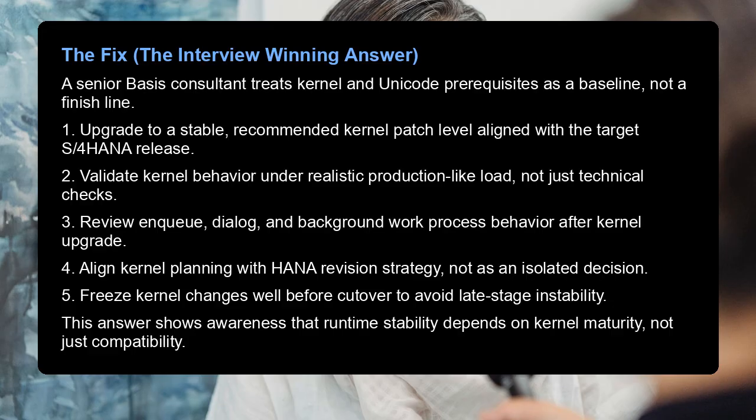4. Align kernel planning with HANA revision strategy, not as an isolated decision. 5. Freeze kernel changes well before cutover to avoid late-stage instability. This answer shows awareness that runtime stability depends on kernel maturity, not just compatibility.